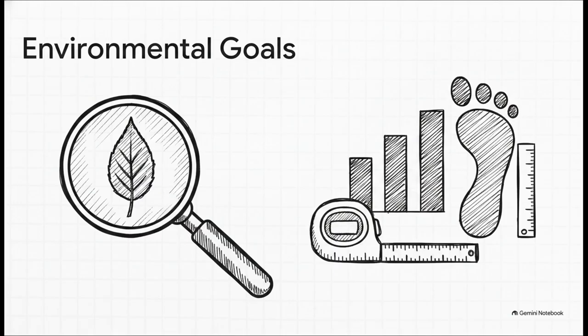Specific means the scope is well restricted so you avoid overlap and everyone knows exactly who the responsible parties are. Measurable means you can easily quantify the steps taken and the progress made. Rule of thumb, if you can't measure it on the site, it doesn't belong in your EMP.